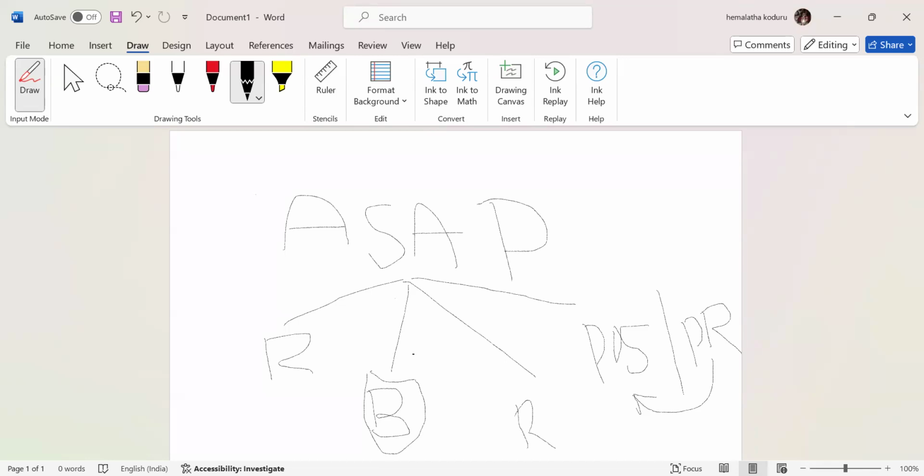You have to prepare that and keep it ready in the blueprint page only, because we are just preparing the documentation; we have still not started the project. After the blueprint documentation is completed, you send emails to your customer or your users who gave the requirement, asking whether the requirement given is correct or not, and you start working on reverse KTs, or reverse workshops, I can say.